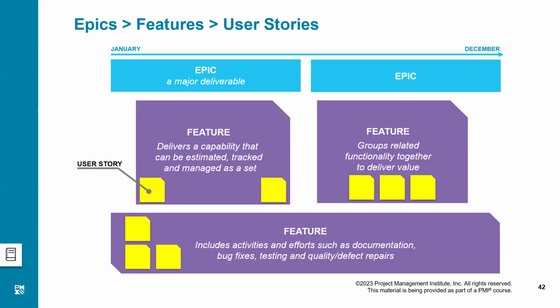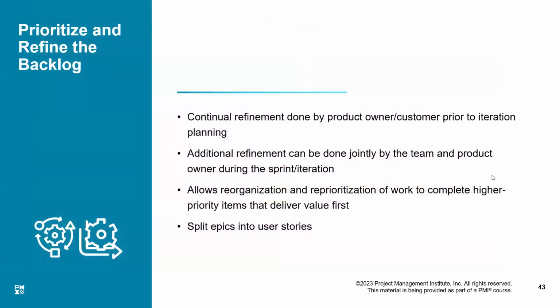But this is not the way of making a decision. Actually, some user stories can be difficult, some user stories can be easier. Therefore, we have to decide the level of difficulty of each user story, based on which I would determine how many user stories I can take up in one iteration. Now, this concept is clear now? Yes, yes, yes. This one is clear.